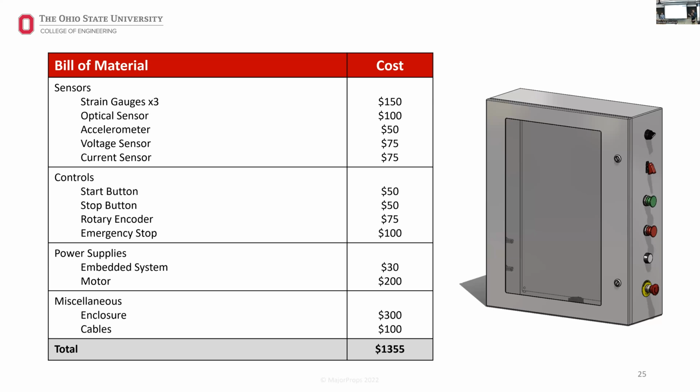So we're estimating around $1,300 for this right now. Again, this is an estimate, and it's still well below our $2,000 budget. So the $1,300 plus our $100 for the prototyping goods still leaves us $500 for things that we're not accounting for, which, as we all know, things come up and you realize, oh, gotta buy this plug or these terminals or stuff like that. So we're leaving ourselves a little bit of wiggle room there.